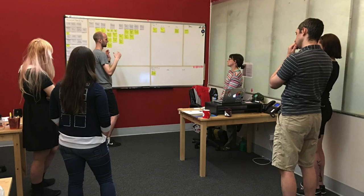Here's a daily stand-up on this project. Everybody that was on the project was in the same location, so we went a little old school. We had a whiteboard with the sticky notes, and so there's some explaining and self-assigning and getting a bunch stuck in the daily stand-up, which was about 10, 15 minutes.